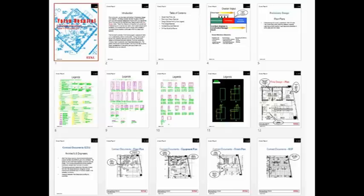And we're kind of a nuisance to help them get what they really want, which is a facility to do their work. So a lot of the terms we use, schematic design, design development, these are foreign terms. So we redefined them in a document here that we give them a hard copy and share in a meeting. But we actually explain what we're going to do and the levels of information and the questions that we're going to ask and the importance of making decisions and the ramifications if we change decisions later.